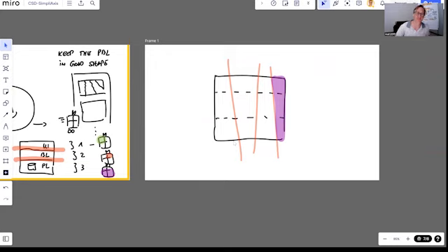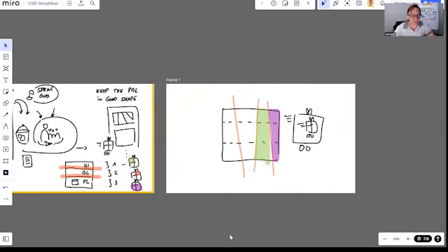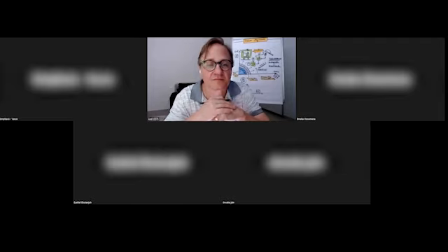So that would be our very first version. By delivering that, we would have a small first version, but it would be working. And then you say, okay, what would be the next slice? Well, the next slice could be, for example, PayPal, right? And we say, okay, that would be the next sprint. So we are going to deliver the next piece here. And so forth and so forth. Guys, does that make sense to you? Yeah, it does.